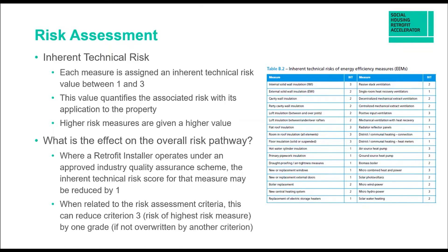So the example here is that criterion three — the risk of the highest measure — can be brought down by one grade, but only if it's not overwritten by another criteria. For instance, you may be doing EWI but if you're installing across 30 or more properties, the overall risk pathway would be a C regardless of the impact on criterion three. It's important to understand the risks with the measures you're putting forward and how they might affect the project overall.